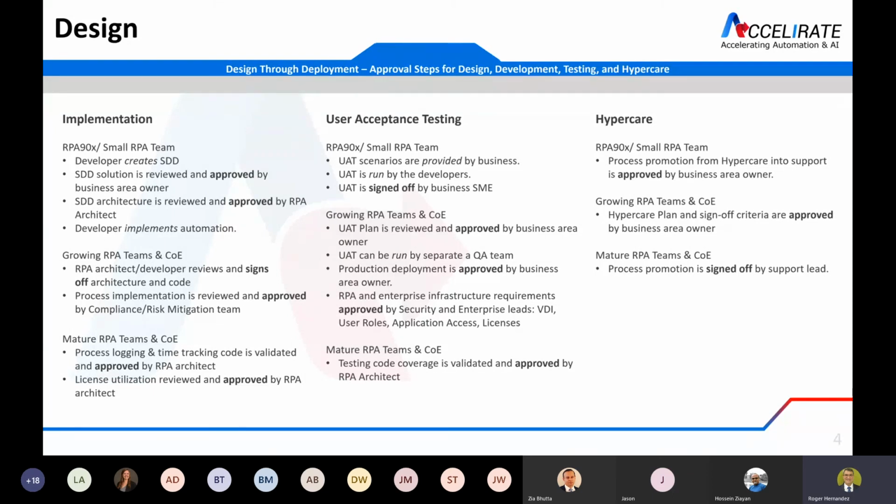If you have a high volume transactional bot, maybe what you're looking at is the number of transactions processed successfully and the percentage. More than 1,000 transactions processed successfully, more than 90% successful. If you have something that runs weekly or monthly, maybe you're looking at 3 full cycles with no errors. If it's high importance but only runs quarterly, then maybe you want to plan out your hypercare deployment so that it spans that end of quarter and your criteria is 1 successful quarterly processing. So it'll vary very differently, and this needs to be evaluated and signed off by the business.